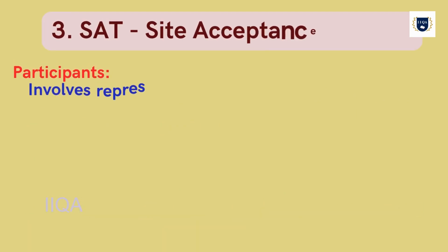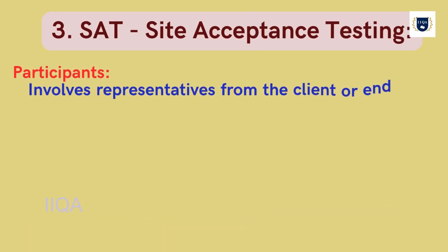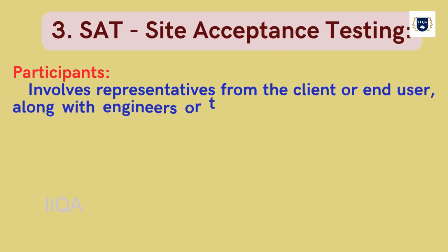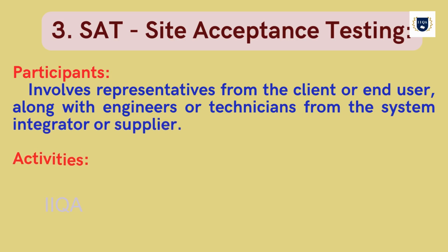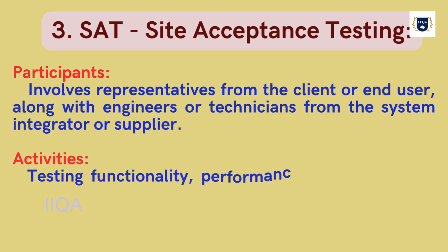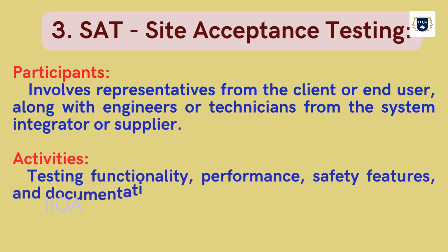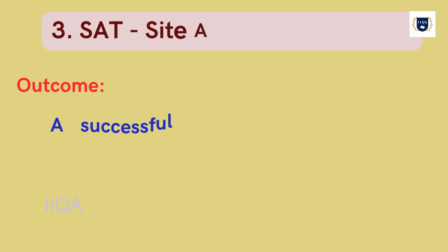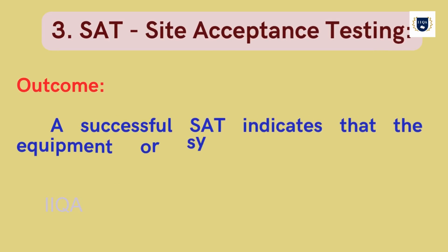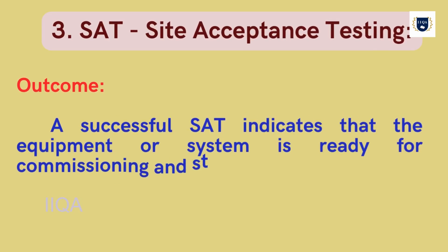Participants. Involves representatives from the client or end user, along with engineers or technicians from the system integrator or supplier. Activities. Testing functionality, performance, safety features, and documentation verification. Outcome. A successful SAT indicates that the equipment or system is ready for commissioning and startup.